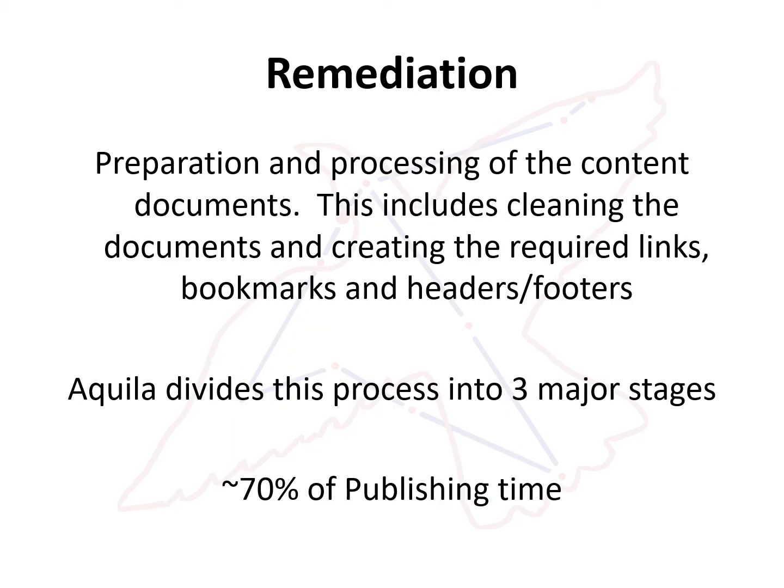Remediation is the largest single group of tasks that you will do for your application. This takes approximately 70% of the total time. This is where you are manipulating your individual documents, you are cleaning them, you are making sure they display correctly, and you are adding in all your bookmarks and links and connecting everything together.